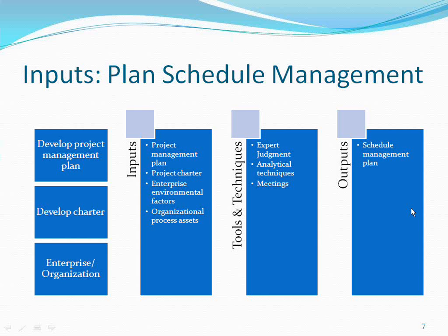Thresholds. When I say threshold, variance thresholds for monitoring schedule performance. What is the agreed upon amount of time variation that will be allowed before some action needs to be taken? 5 minutes delay, I'm okay. So that's what you will plan upfront. When are you going to pitch in and when are you going to control the situation?